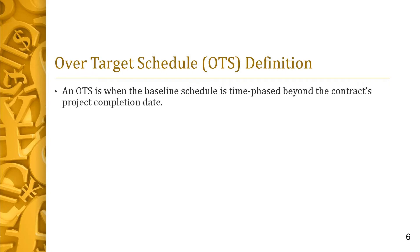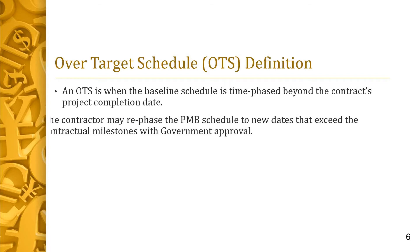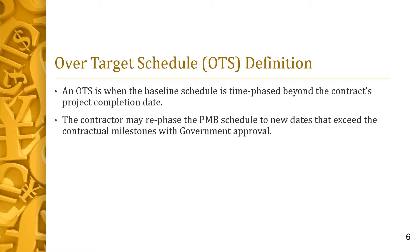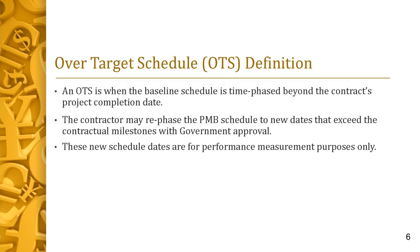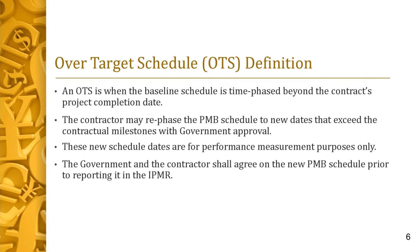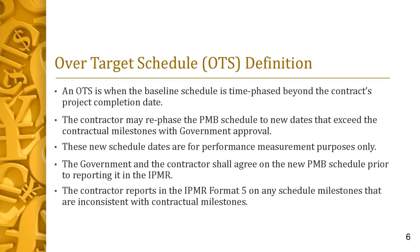An over-target schedule (OTS) is a condition where the baseline schedule is time-phased beyond the contractual project completion date. The contractor may re-phase the PMB schedule to new dates that exceed the contractual milestones — a condition known as an OTS — with government approval. However, these new schedule dates are for performance measurement purposes only and do not represent an agreement to modify the contract terms and conditions. In accordance with the DOE IPMR instructions, the government and the contractor shall agree on the new PMB schedule prior to reporting it in the IPMR. The contractor shall provide pertinent information in Format 5 on any schedule milestones that are inconsistent with contractual milestones, beginning the month the OTS is implemented and each month thereafter.